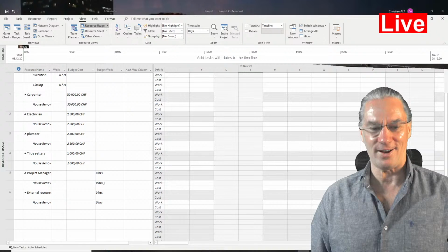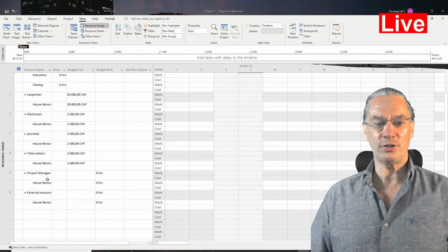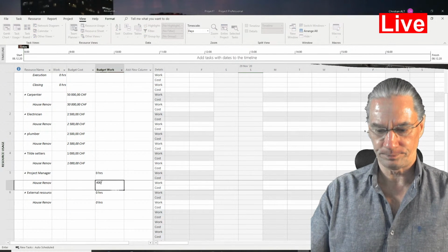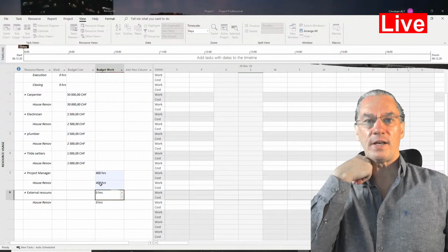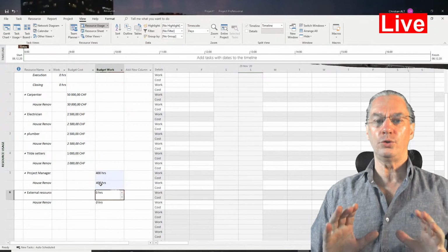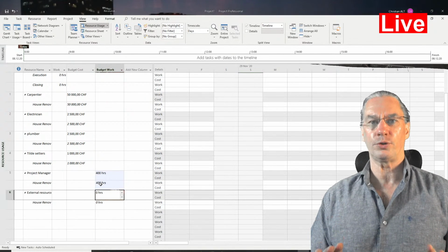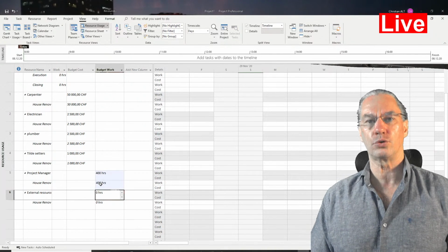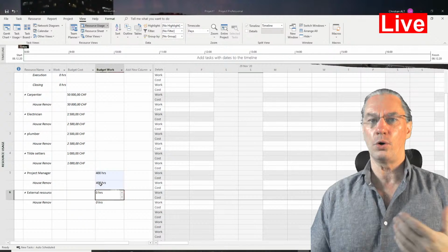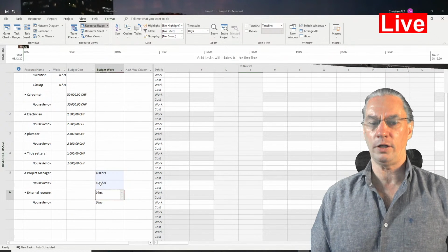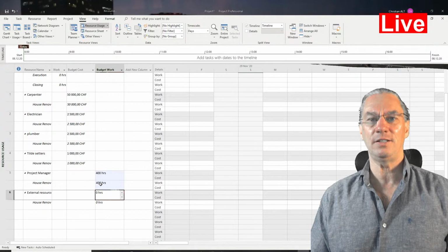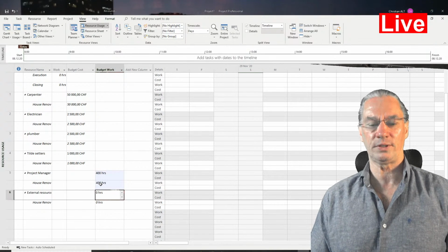So, house renovation for the project manager, I'm going to say here 400 hours. This is a typical situation when you do a renovation or you do your construction and you are yourself in charge of what you want to do. You need to go and visit a lot of suppliers, contractors, get ideas on what you want, what you don't want.